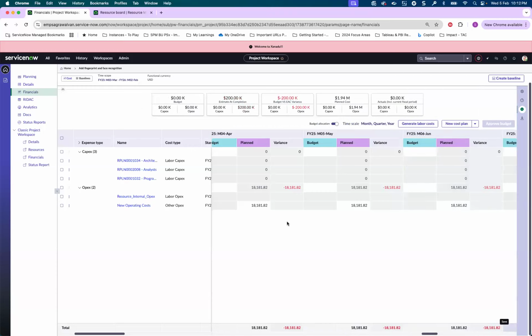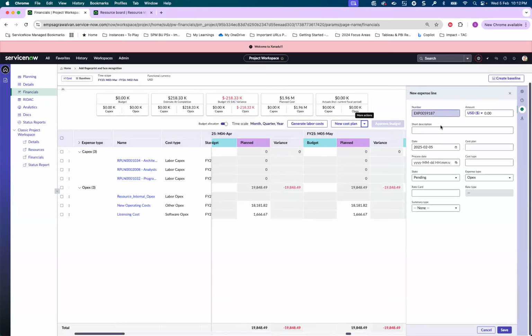Once I do that, you should be able to see a new line item over here, the licensing cost. This is nothing more than my plan cost, and it is going to contribute to the plan cost over here. At the same time, assuming some expenses are going to be incurred, I do have an option to start taking care of my expenses. It's still February, but just for the demo purpose, I'm going to put something in April. So I got the actual cost of 1000.